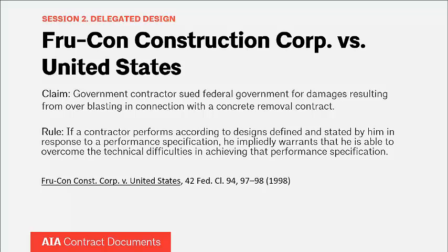And the key piece of evidence here against the contractor was that they literally designed everything about their blasting protocols. The government's specification was that they wanted a desired result. They wanted X amount of concrete removed. And the contractor went about putting together the entirety of the blasting protocol, so they're following essentially a performance specification. And they ended up overblasting what they were intending to blast.